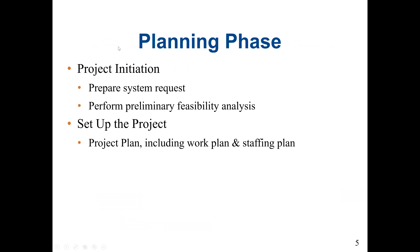In the planning phase, this is where we have project initiation. We are going to prepare the system request and also perform a preliminary feasibility analysis. We will discuss three types of feasibility analysis: technology, economical, and organizational. Then we set up the project. The project plan should include the work plan and also the staffing plan.